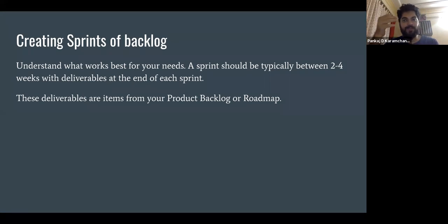But at the same time, when we did start getting users, we moved to a 2 week sprint. 2 week sprints are very common. Even my current company, we are doing 2 week sprints. But in Geo, we had a month long sprint. The organization is large, even the testing process takes time. So we had a month to actually get everything done.